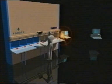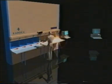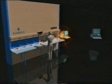A prototype was developed and installed at a small John Menzies warehouse in March 1996. The results were impressive. The pilot that we undertook was designed to test out a number of concerns. Would the system physically work? Answer yes. How long does it take to build? A week. How long does it take to commission? A week. Having run the pilot for a relatively short period, it became clear we had something worth developing further and knocking the rough edges off.